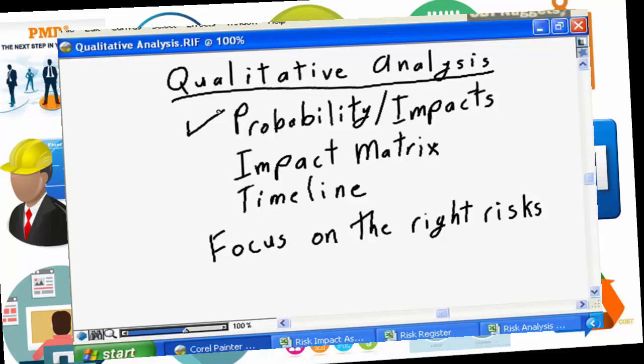Now that we're in qualitative analysis, we should have more information, more details related to the risk, and again, we may want to go back and reassess some of the values, some of the assessment we did during preliminary risk identification. We may need to put the risks on a further impact matrix to further understand which risks truly warrant our attention and truly warrant active risk management, and which risks, as I said, can simply be ignored and dealt with during routine project delivery.